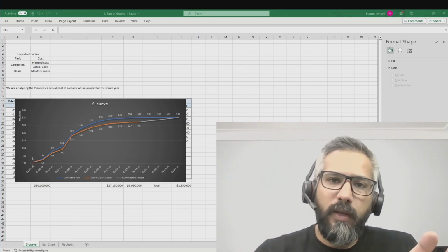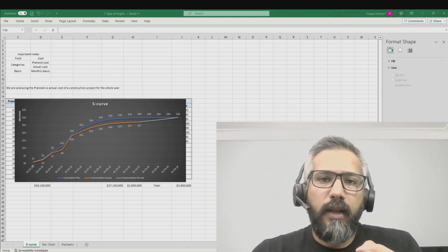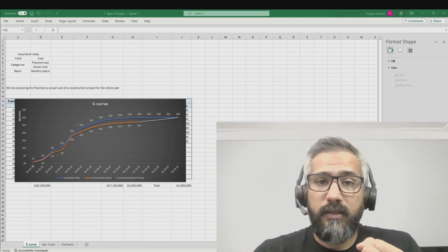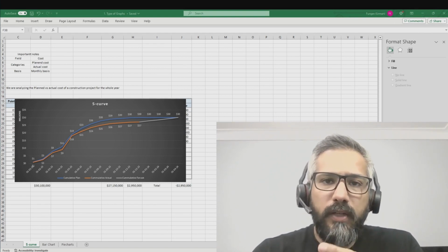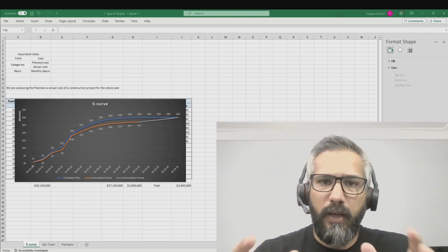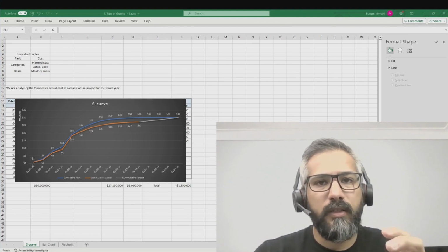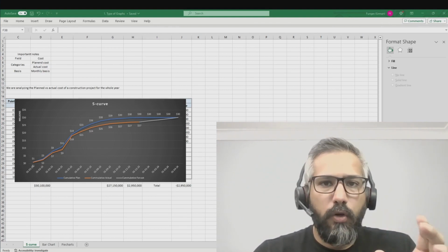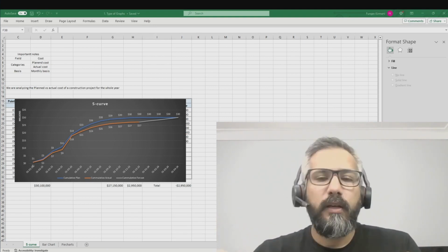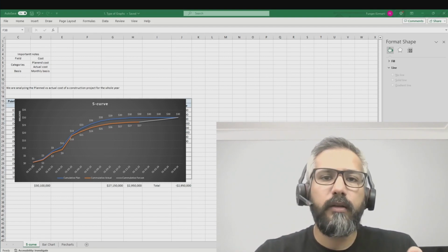Similarly, in conclusion, I wanted to tell you that for me, S-curves are the best. They give you a trend line and the trajectory of your progress. With the trajectory of your project, you can make better decisions. Histograms are basically used at the start of the project, in the planning or estimation stages, to give a plan of how things will be moving, and a better understanding of where the major chunk of your field, for example cost, is going and where you have to work more. But as we move forward, we use bar graphs. Bar graphs are used during the course of the project.